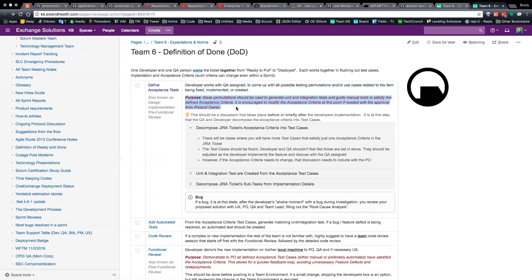These permutations, or test cases as we're calling them, should be used to generate unit and integration tests and guide manual testing in satisfying the defined acceptance criteria. It is encouraged to modify the acceptance criteria at this point if needed, with approval from the product owner. If you ever modify the acceptance criteria during the sprint when you've already committed to it as a team, you need to verify that with the PO and the QA. The test cases, however, can fluctuate and change — you don't need to verify that with the PO every time, because the test cases should always satisfy the acceptance criteria.